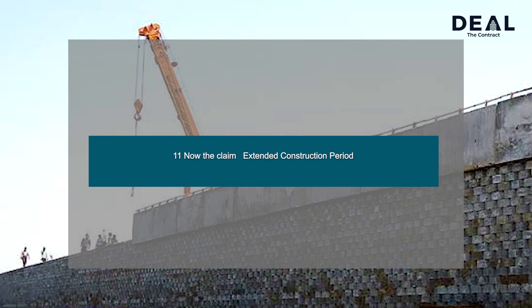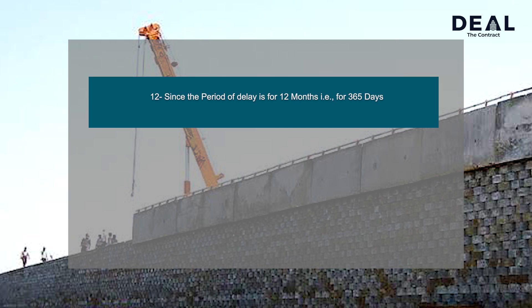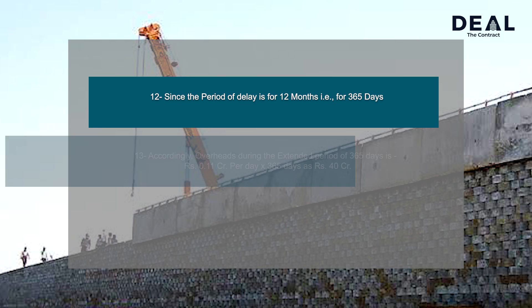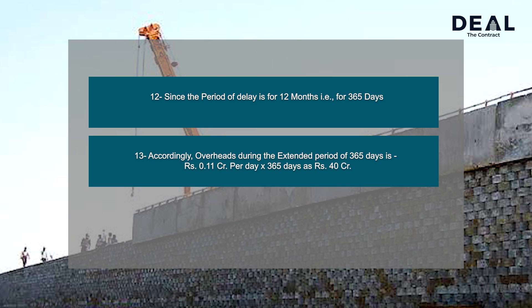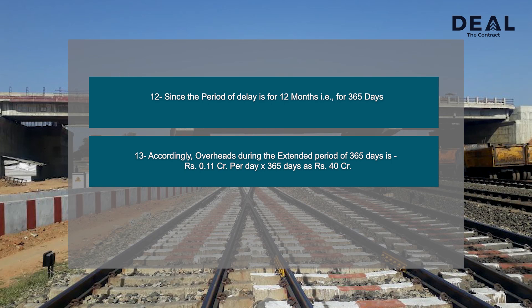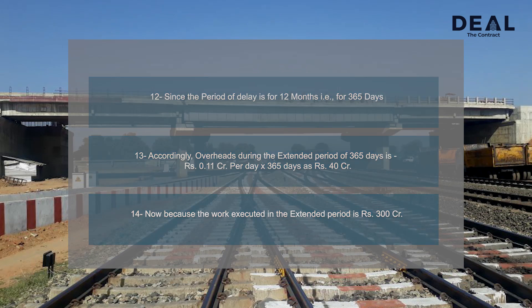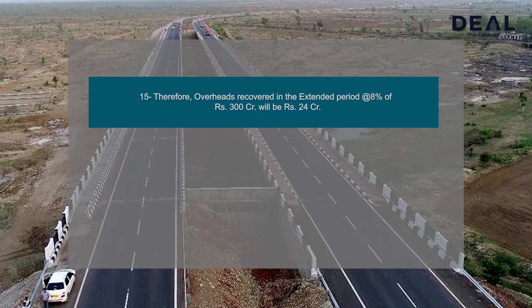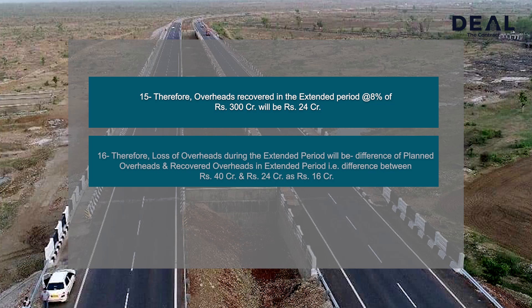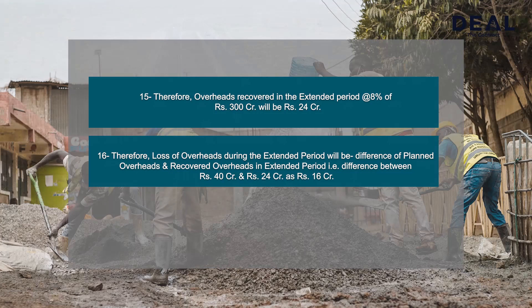Now the claim in the extended construction period: since the period of delay is 12 months, i.e. 365 days, overheads during the extended period of 365 days = Rs. 0.11 crores per day × 365 days = Rs. 40 crores. Because the work executed in the extended period is Rs. 300 crores, overheads recovered in the extended period at 8% of Rs. 300 crores = Rs. 24 crores. Therefore, loss of overheads during the extended period = Rs. 40 crores minus Rs. 24 crores = Rs. 16 crores.